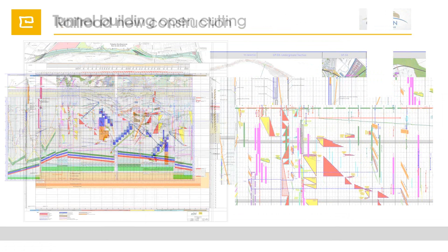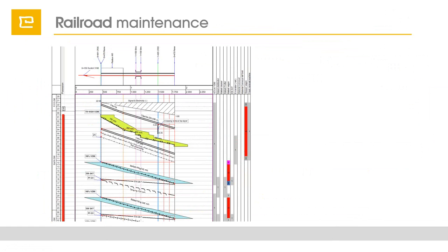In the railway industry in Germany, we use it very intensively for repair projects. Repair projects usually start on Friday evening while the track is completely closed, and the track is reopened on Monday morning, and within a precision of 15 minutes the schedule has to be met. For example, this yellow area is a track renewal train. It takes the old sleepers out and installs new sleepers, and the front of the train is driving on old tracks while the end of the train is usually on the new tracks already.